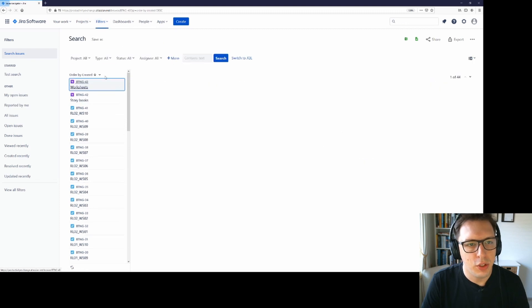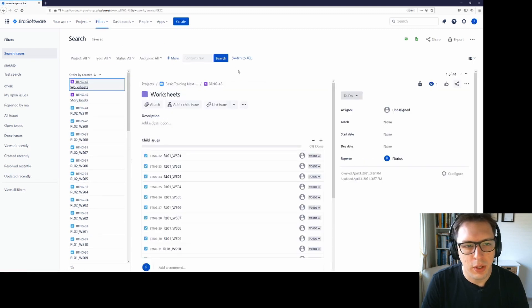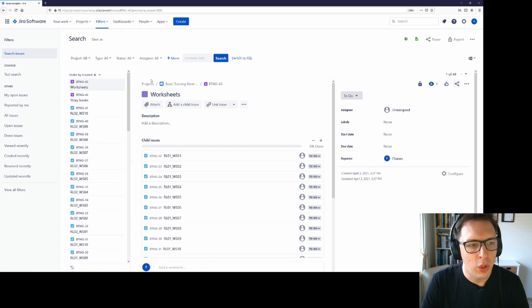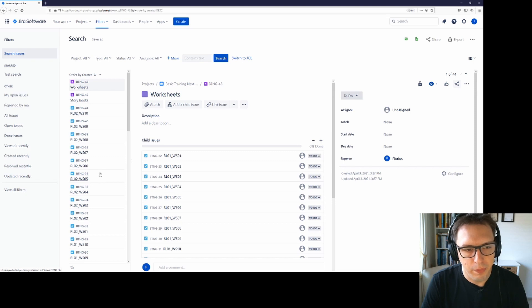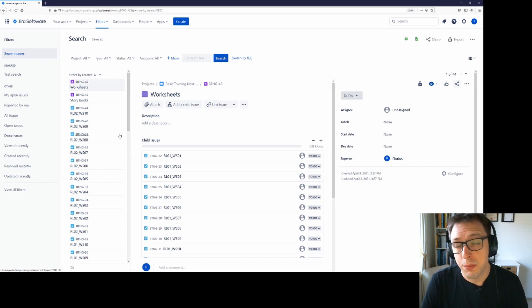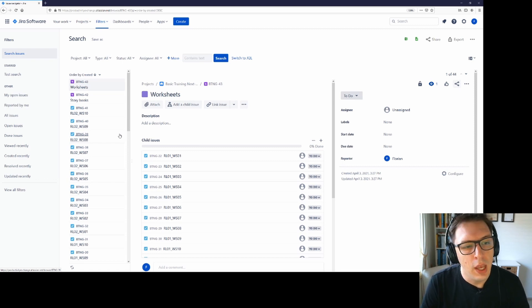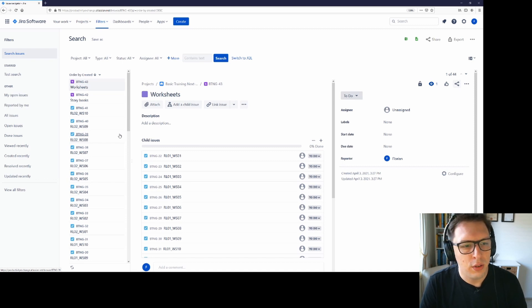I'll just make it the blank version so that we can talk through everything from scratch. Now, when you open up advanced issue search, it will open up every issue from every project. This can take a little bit of time to load and can be quite slow depending on how many projects and issues you have in your JIRA instance. But there is a workaround that I can show you at the end of the video.